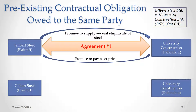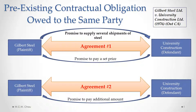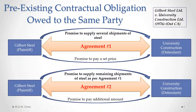So that led to agreement number two between Gilbert Steel and University Construction. Under agreement number two, University Construction had agreed to pay an additional amount for the steel, and that additional amount was for Gilbert Steel to supply the remaining shipments as per the original agreement — agreement number one.